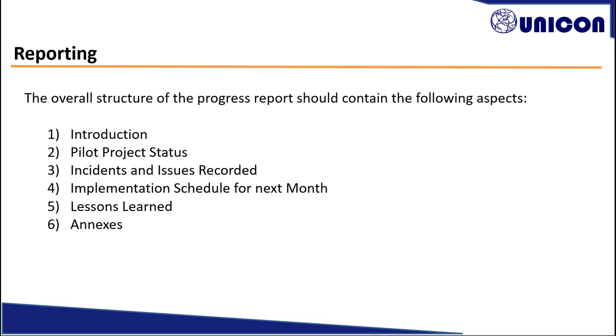The recommended content of the progress report: introductory part, where you provide information on the background, objectives, implementation context, and other introductory information. Pilot project status, including objectives achieved, activities undertaken, planned versus achieved deliverables, key project outputs, resources and budgets used,